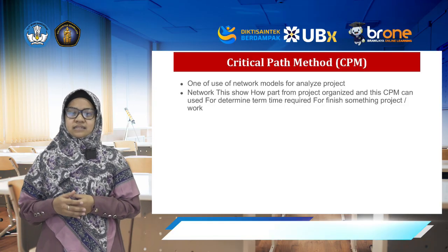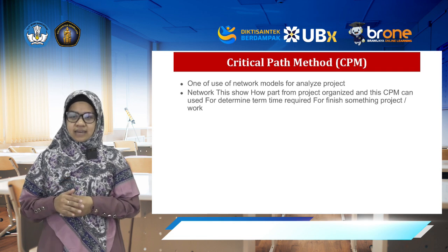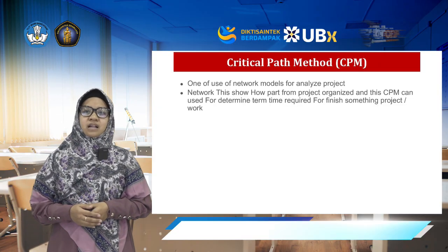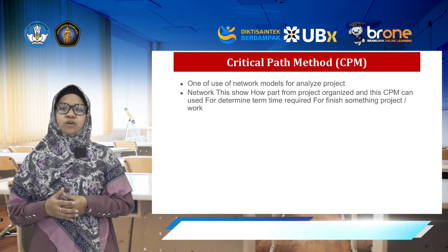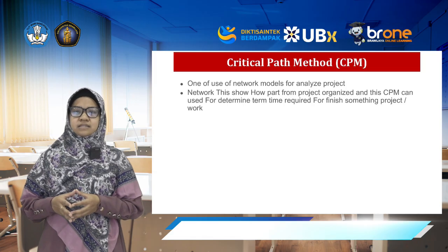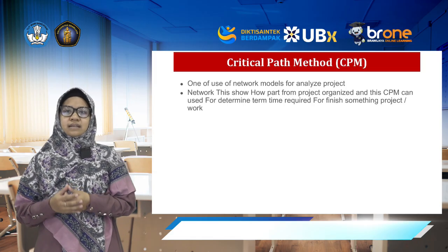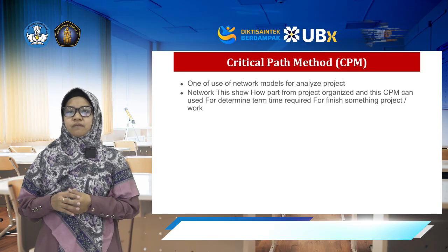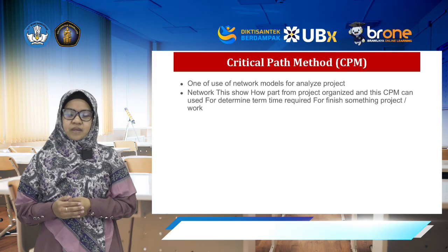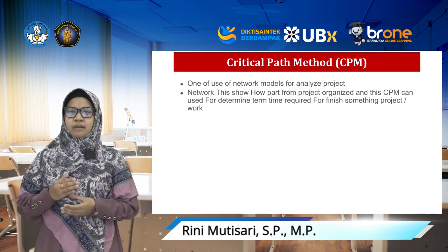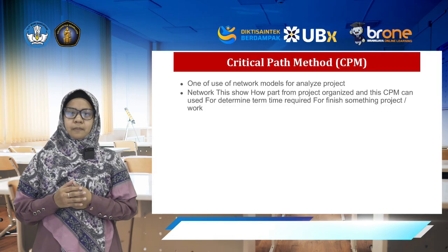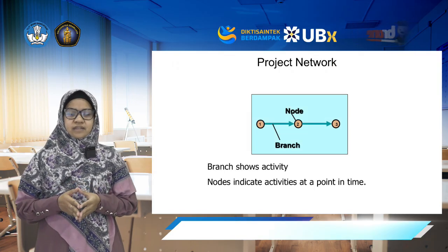That instantly guides priorities. If time is tight, we watch the critical tasks like a hawk. Third, CPM helps with resource planning. Once we know which tasks are critical and which have slack, we can move people, equipment, or budget from non-critical work to the bottlenecks without hurting the finish date. The fourth, it supports risk management. By seeing where there's zero slack, we can pre-position buffers and backups or break down long critical tasks before they surprise us.